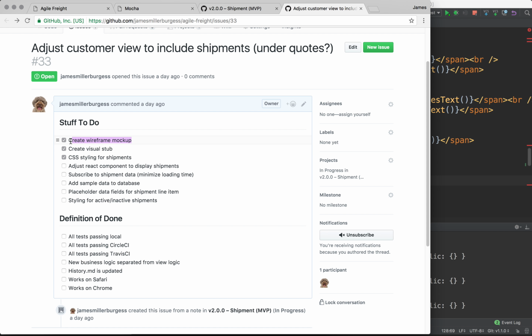And that's typical of a new Scrum team, that they won't necessarily know every step involved in completing a product backlog item. But as they gain experience, they're going to be more likely to identify all the tasks up front, and they're going to be better at estimating because they have a better idea of how long this will take, how long this will take, and how long this will take.